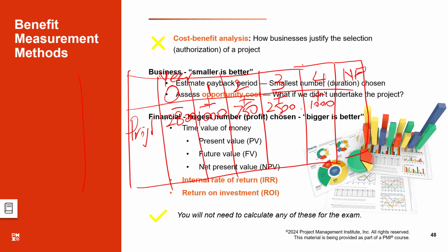So this is 4,500 and 5,250 minus 2,800. So it will be 2,450. $2,450 is your net profit. Do you agree with me? Yes. Well, this looks very nice, but this is not a very good method.